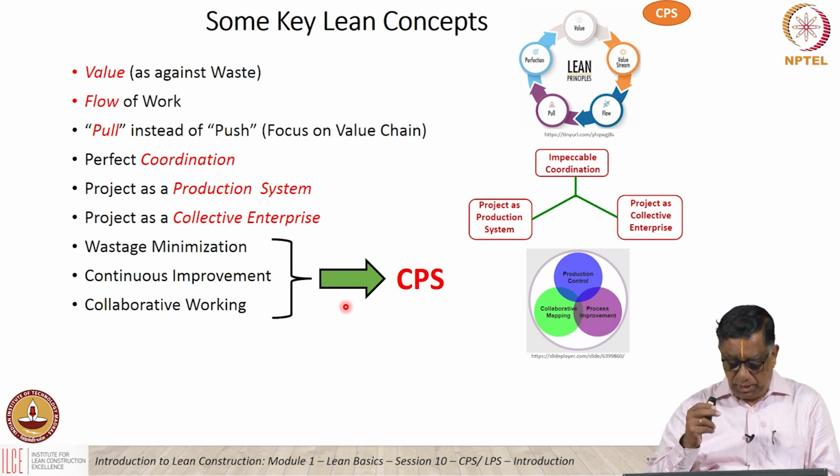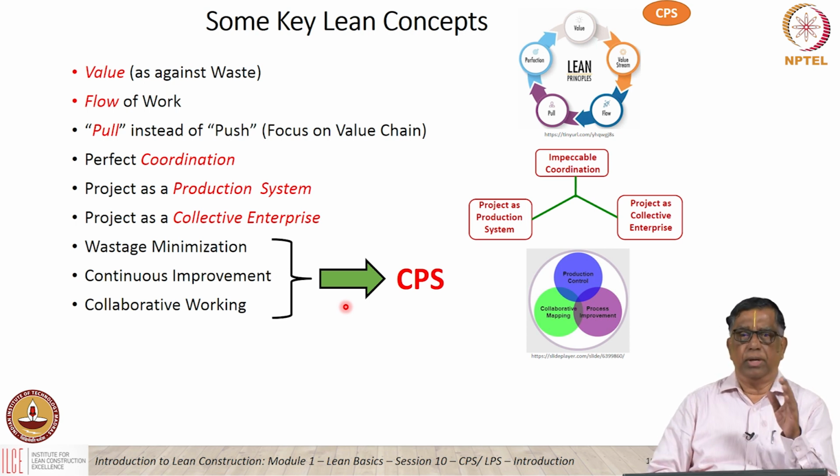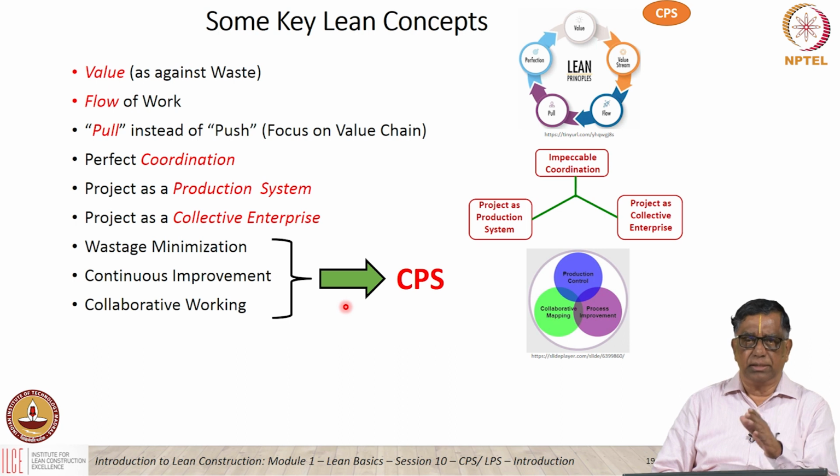And then again, if you look at typical sites, from one activity to another activity, people tend to push the work down to the succeeding activity. For example, a rebar compared to a concreting activity. The rebar man is not concerned whether the concreting man is ready with the front, ready with the method, labor, all those things. He will keep on producing rebars, and they all keep lying, whether used or unused, we don't know.